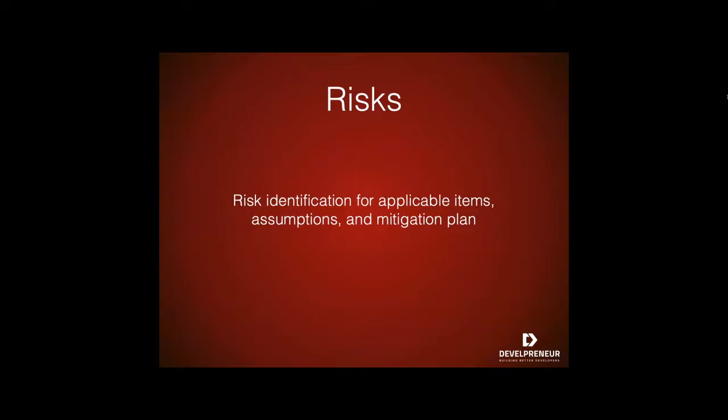For example, requirement definitions will be completed by January 1st, say 2000, and if the requirement changes after that date, the following actions will be taken. The test schedule and deployment schedule will move out an appropriate number of days. This rarely occurs as most projects tend to have fixed delivery dates. The number of tests performed will be reduced. The number of acceptable defects will be increased. These two items could lower the overall quality of the delivered product.